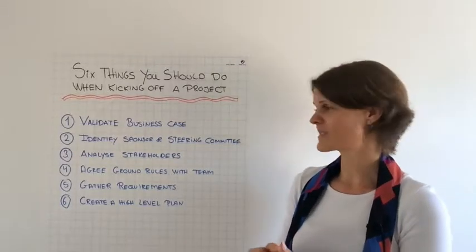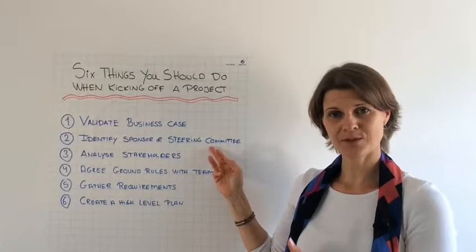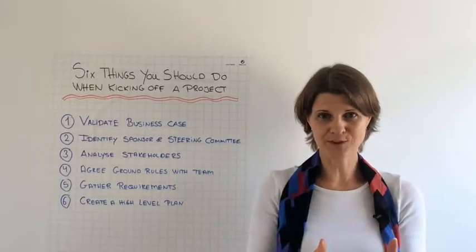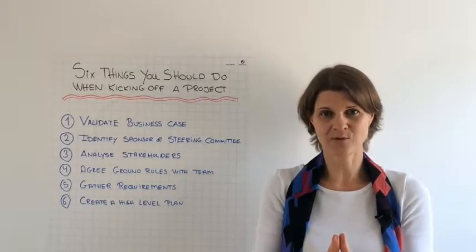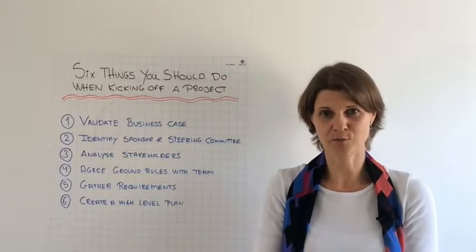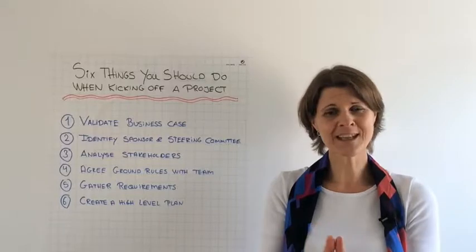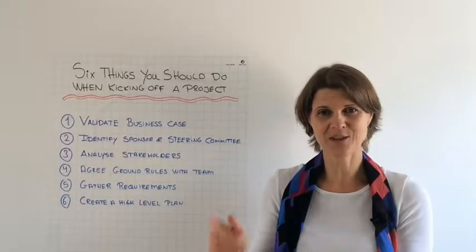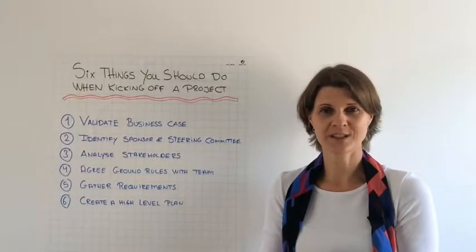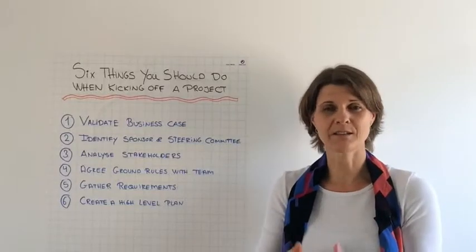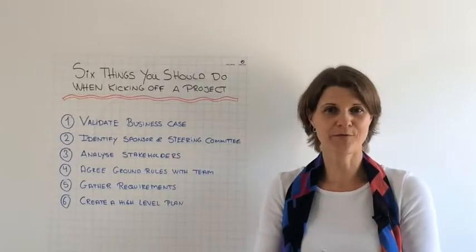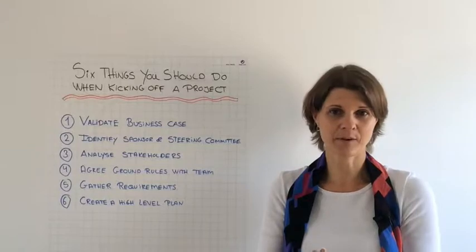You also need to identify the steering committee members. They are there to support the sponsor in making sound decisions throughout the project. And I would also set up regular steering committee meetings right from the beginning of your project. When I say regular, I mean probably monthly, but other frequencies might apply as well.